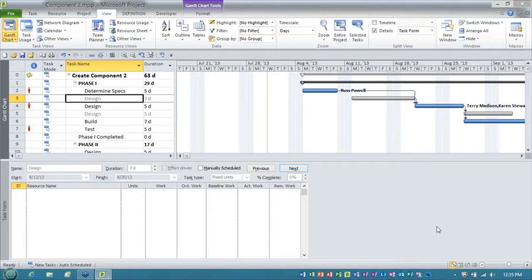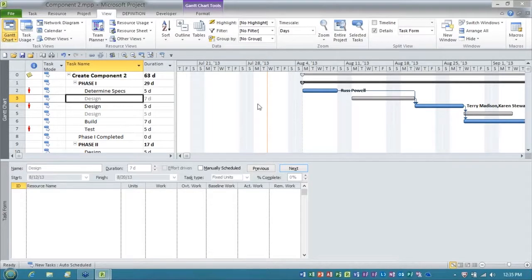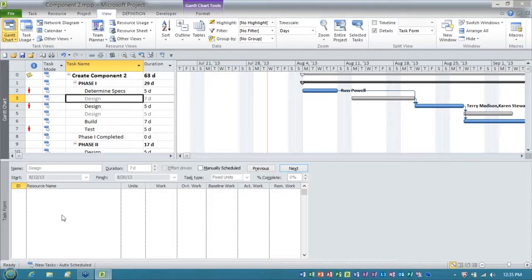What you will find out with ghost tasks is Microsoft Project will only show you limited information about those tasks if you're not in the master. For example, if I select the task design, which is the ghost task, notice, and then I go to the split screen view so I could look at who's assigned to it. See, you can't see anything.